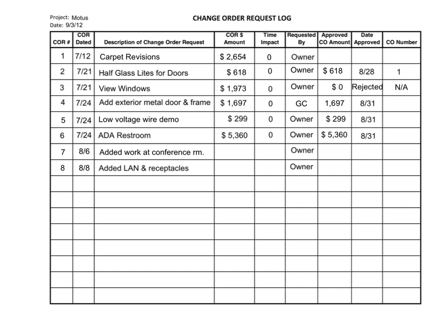If we review an example of a change order log from a project that is underway, you will notice there are change order requests or CORs in various stages of development. You will notice, for instance, that COR number 1 was the first change identified and entered into this log. It has been priced and submitted to the owner for approval, but no action has been taken to date. It is neither approved nor rejected. It is simply under review. Initially, it was priced and submitted with no schedule impact anticipated. However, the schedule aspect may have to be revisited should the owner decide to pursue this change.